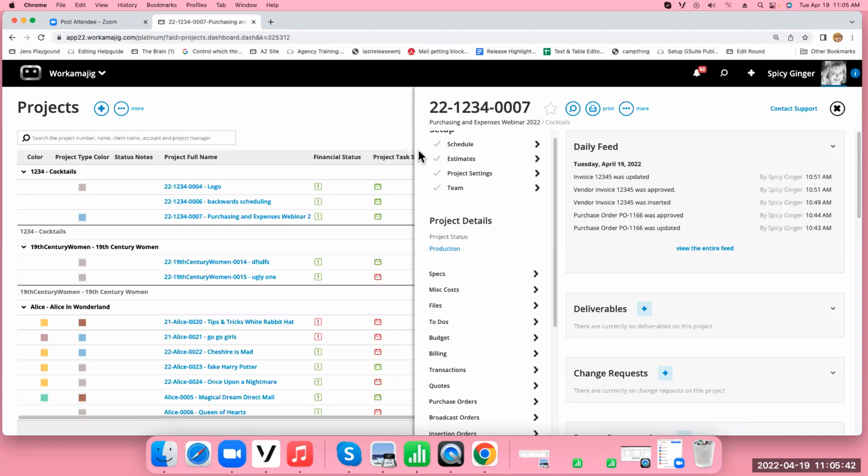I have one more question, Leslie Stout. If you have a fixed fee, you can't change the approved estimate. That's the fixed fee and it's fixed. Well, technically you could change it later by unapproving it and adding to it. I should have talked about that, because it's not just a matter of going and changing it. You would have to add it later and advise the client that this expense came up, and technically you should probably make it a change order, which I didn't talk about.